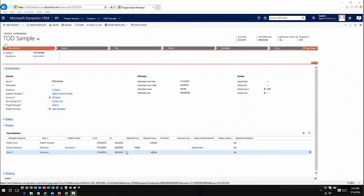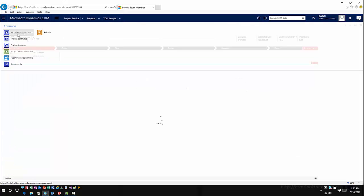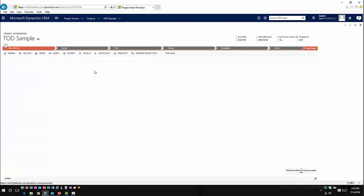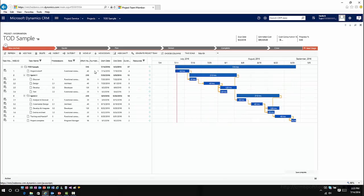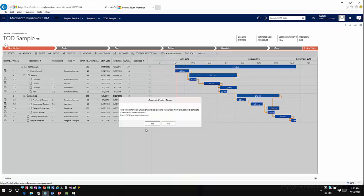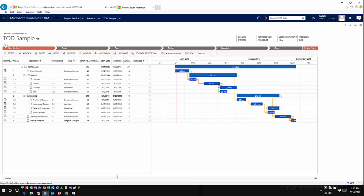Now I can see that I've created a generic resource called developer that I can use for part of this application going forward. As I have my team created, I have generic team members with items defining when they're going to be working on this particular project. This is where I can now go into my work breakdown structure. One of the nice things is I also have the capability to have the system generate the project team for me, which removes unassigned roles and creates generalized resources based on those situations.